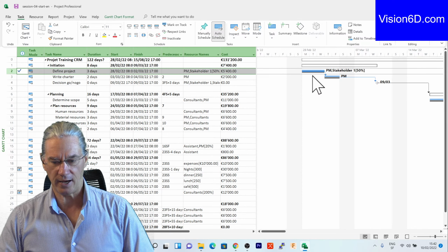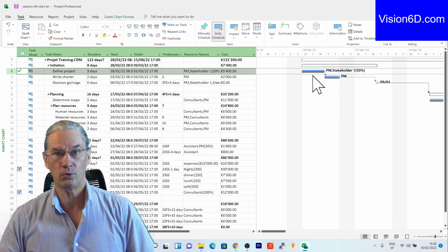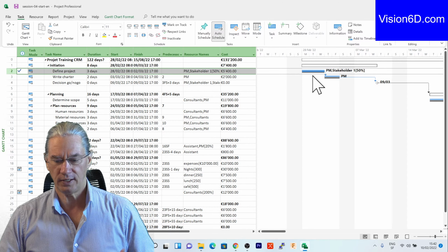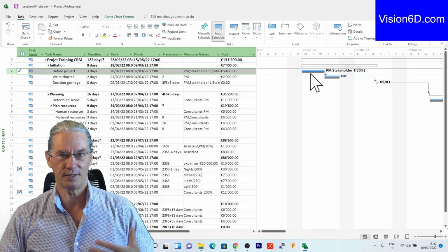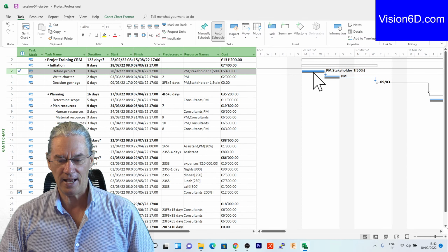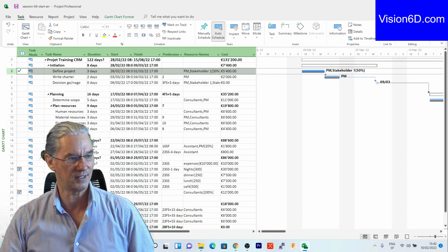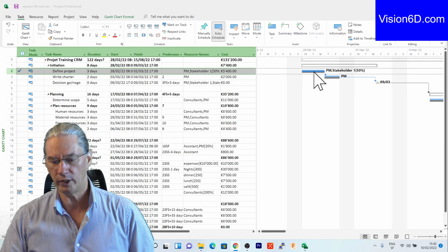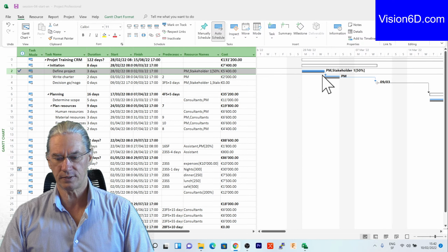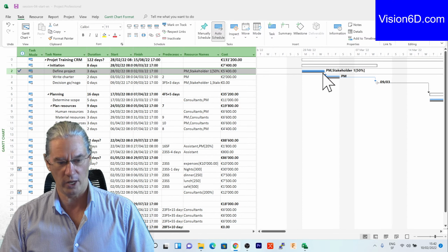You see that now we have 3 bars. We have the clear blue, which is how the project duration is scheduled. The gray one is how it was baselined, and there is a darker blue in between. I'm just checking that you can see it, and that darker blue is telling you how we are moving into this project. So at this point, we moved perfectly well.